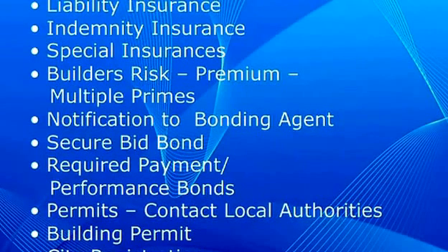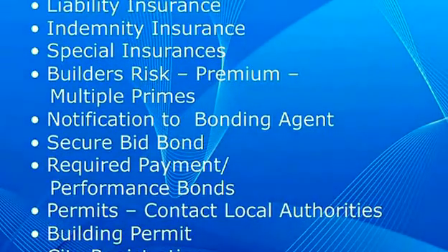There's a wide range of what that covers, but basically if somebody out there, whether it's the general public or another contractor, decides that they want to sue you, you want to have insurance behind that, because that can get very expensive, and this insurance is not cheap. Liability insurance traditionally breaks down as a general contractor to work that you have subcontracted out, because quite frankly that carries a separate premium, okay, versus work that you're self-performing or doing with your own labor. Okay, there's a different premium level for those two.